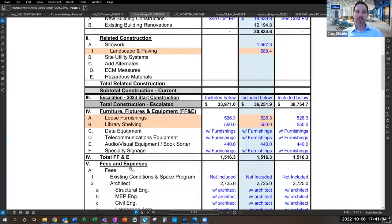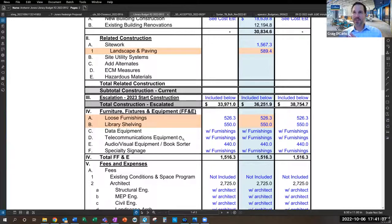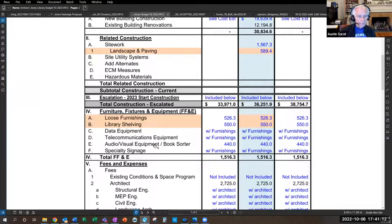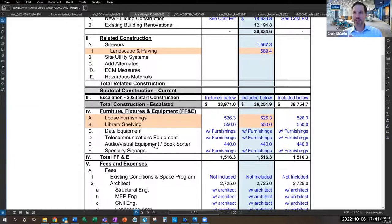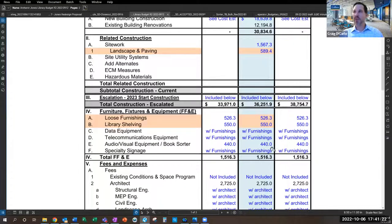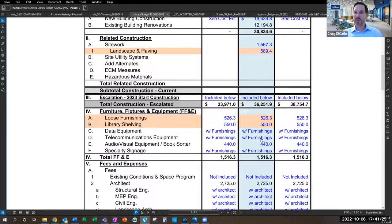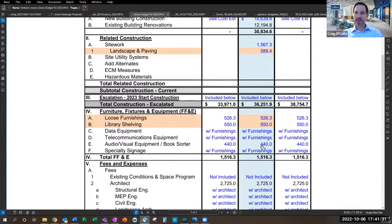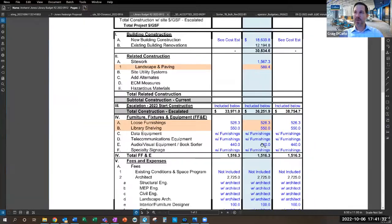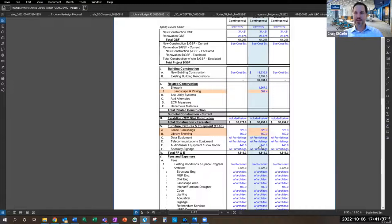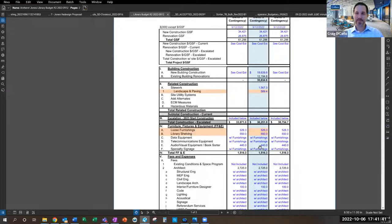Craig notes this falls within the budget line item of audio-visual equipment and book sorter at $440,000. If they end up at the upper end of $429,000, it leaves about $10,000-$11,000 for AV, maybe one room setup. If the lower range of $379,000, they'd have a good amount for AV equipment. The good news is it's within budget and they can continue refining the number.